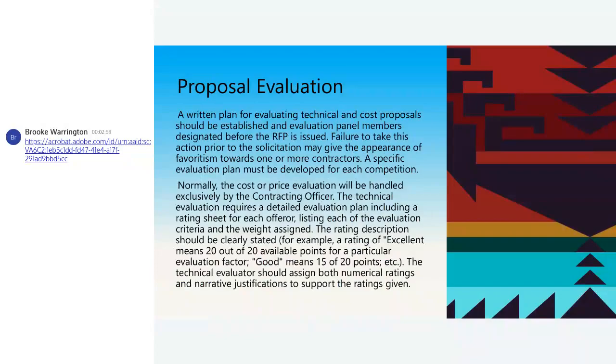A written plan for evaluating your technical and cost proposals shall be established and evaluation panel members designated before that RFP is issued. Failure to take this action prior to the solicitation could give the appearance of favoritism toward one or more contractors. A specific evaluation plan must be developed for every competition. Normally, your cost and price evaluation is going to be handled exclusively by your contracting officer.